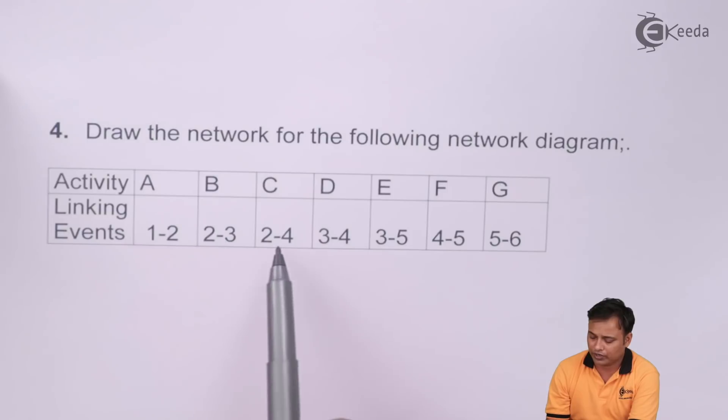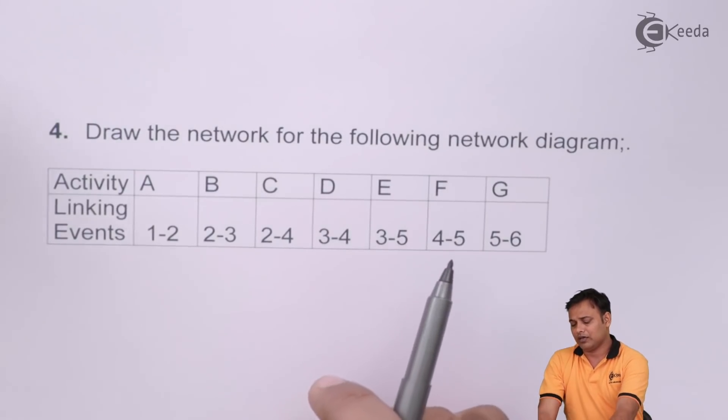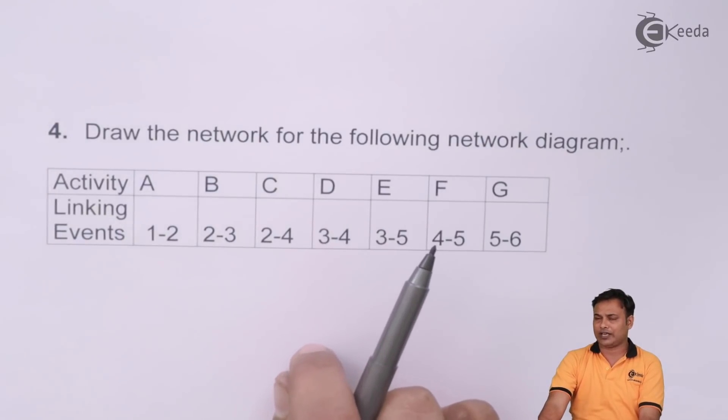1 to 2, 2 to 3, 2 to 4, 3 to 4, 3 to 5, 4 to 5 and 5 to 6. Now this can be drawn directly without any preceding or the succeeding activities.